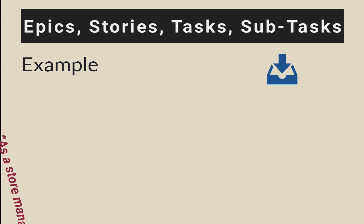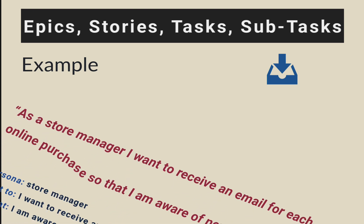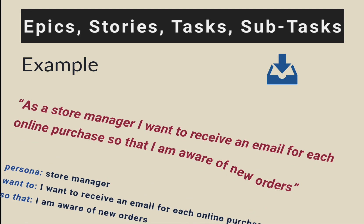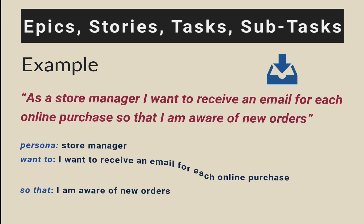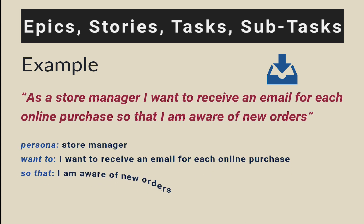As a store manager, I want to receive an email for each online purchase so that I am aware of the new orders. Here, store manager is the persona. 'I want to receive an email' is what we are trying to achieve. And 'so that I am aware of new orders' is the benefit of getting this user story developed.